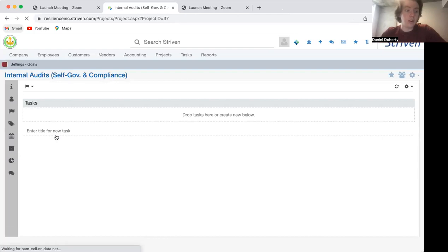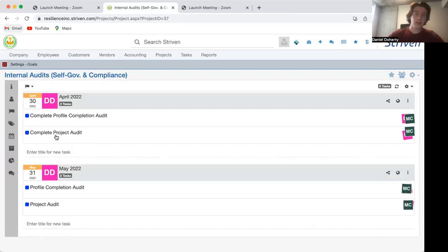So we have 12 pieces to our rubric. Each of them is worth 1 point. If you have 6 of the 12, you'll get a 50% grade. 8 of the 12, 66%, and so on. And then the 12 pieces are your milestone, task, type, manager or team, division, start date, end date, objective, if your project plan is linked to the Google Drive, if there's a detailed description of the project, if every team member is tasked, and if you have a budget plan.